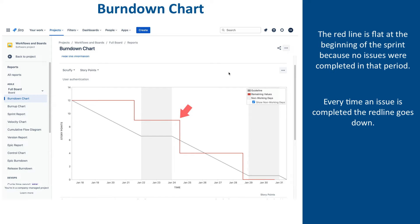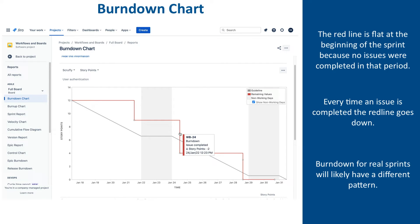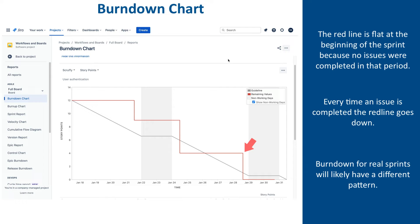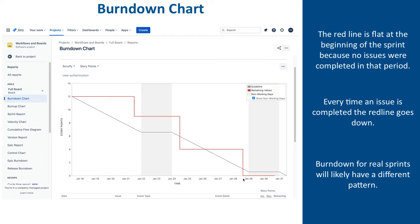Then here, two stories were completed on the same day — WB-24 and WB-33 — and the red line went further down, even below the gray line. After that, work continued with no completions until the final two stories were completed and the red line came down to zero, indicating the team completed all the planned work.